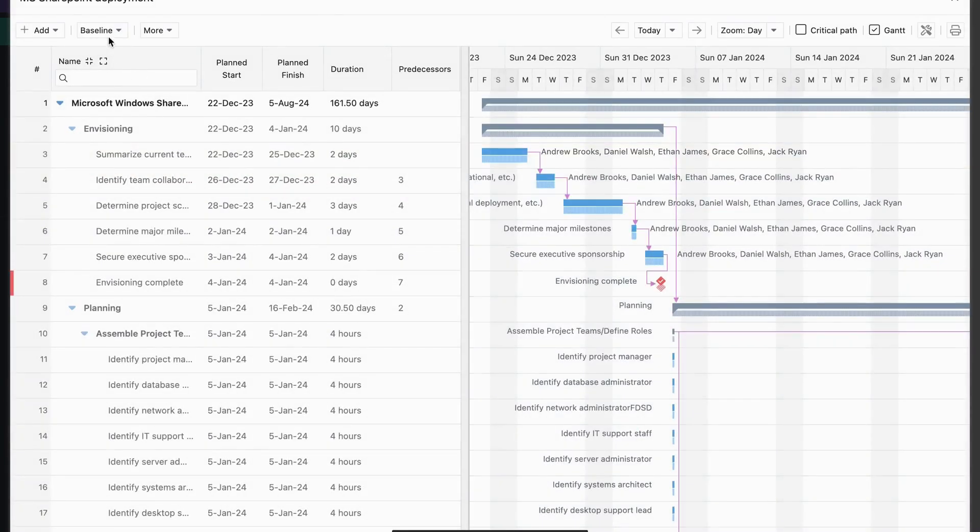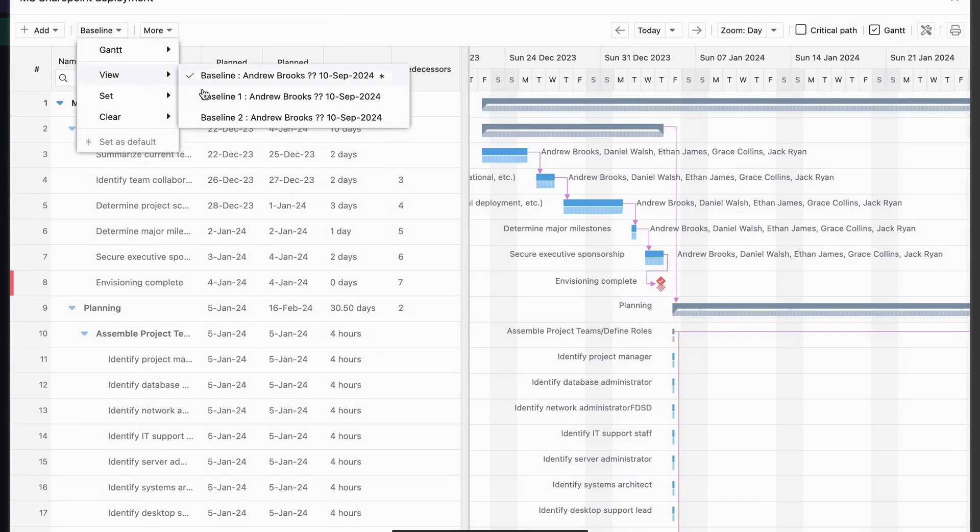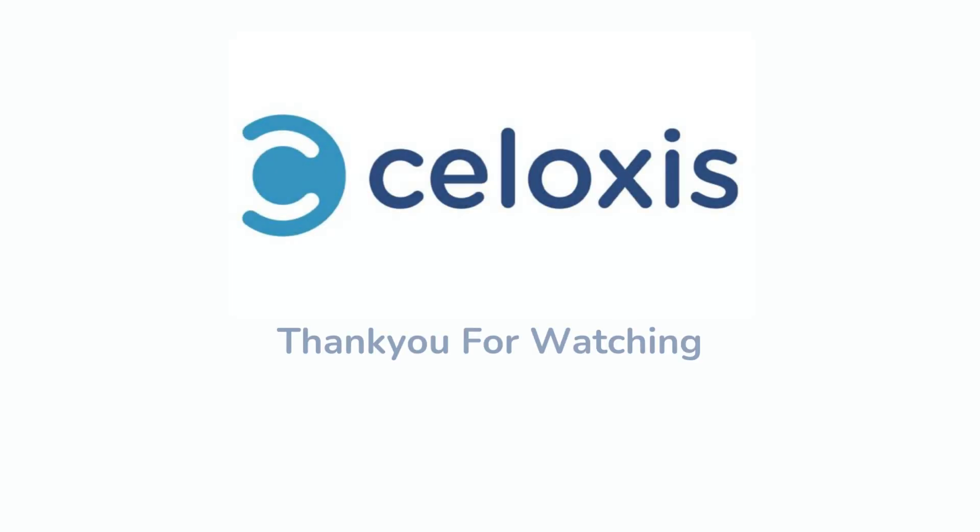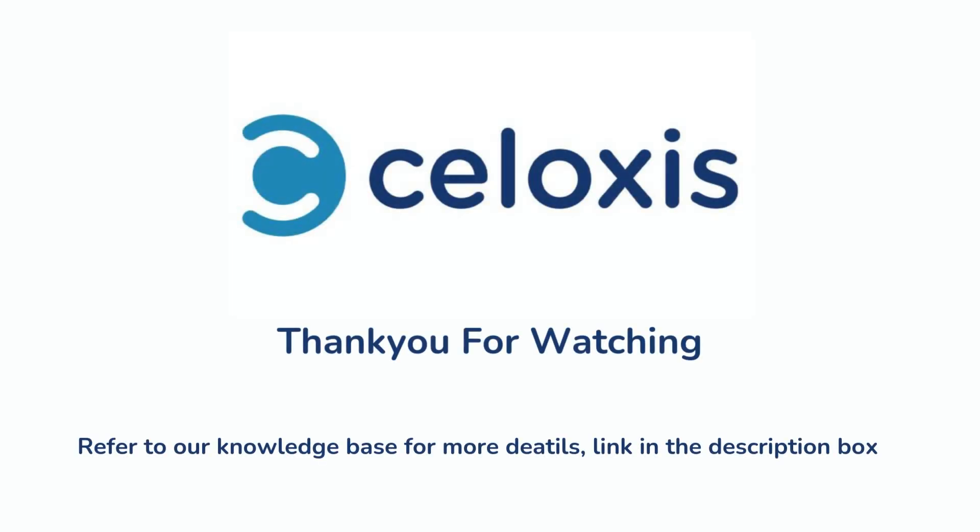To view this baseline, go to the View option, select your desired baseline and you're all set. And there you have it. We've successfully added and viewed multiple baselines in Soloxys. Thanks for watching. See you next week.